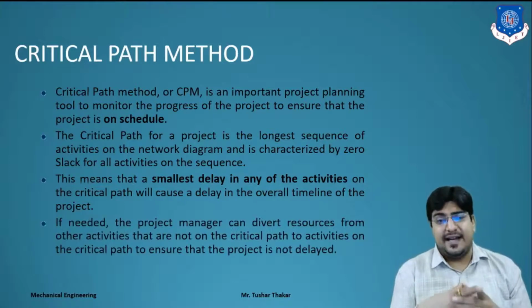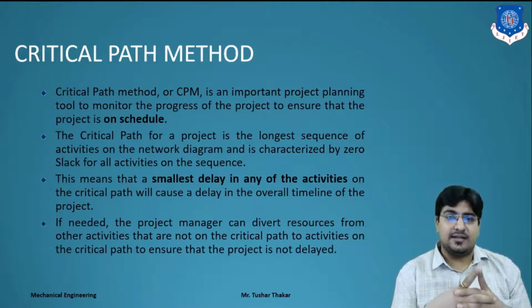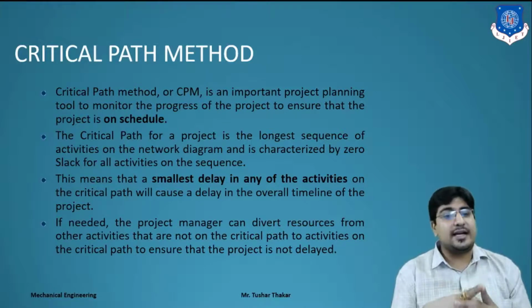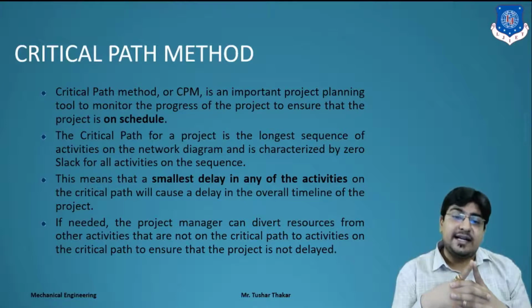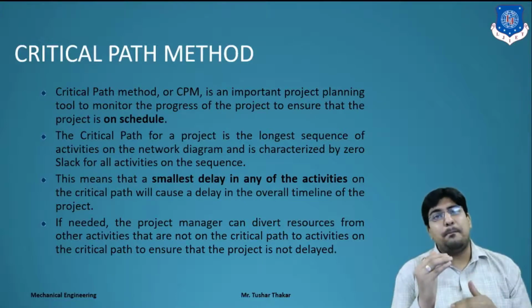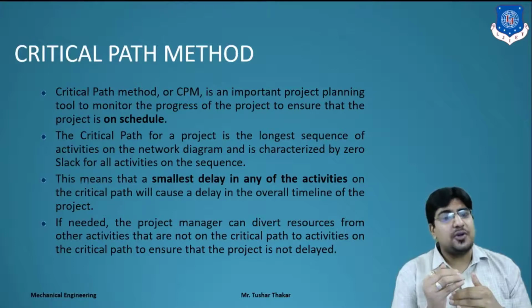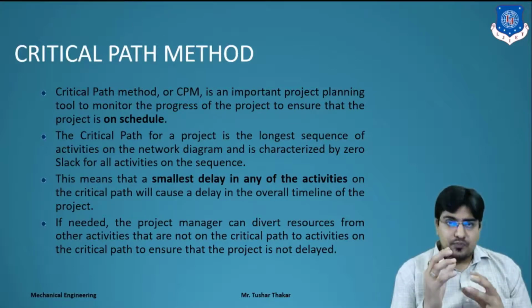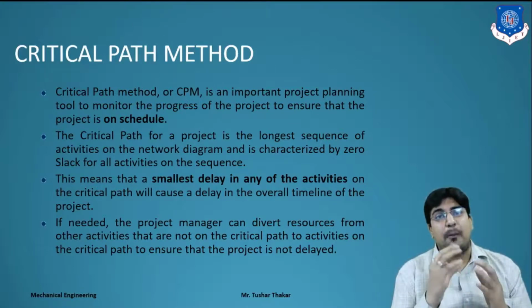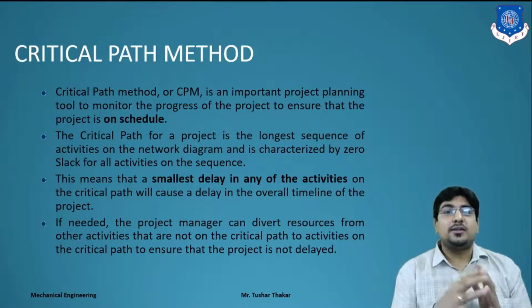If needed, the project manager can divert resources from activities that are not on the critical path to activities on the critical path, to ensure the project is not delayed. It means project managers give an assurance and keep full attention so that the project will not be delayed, right?